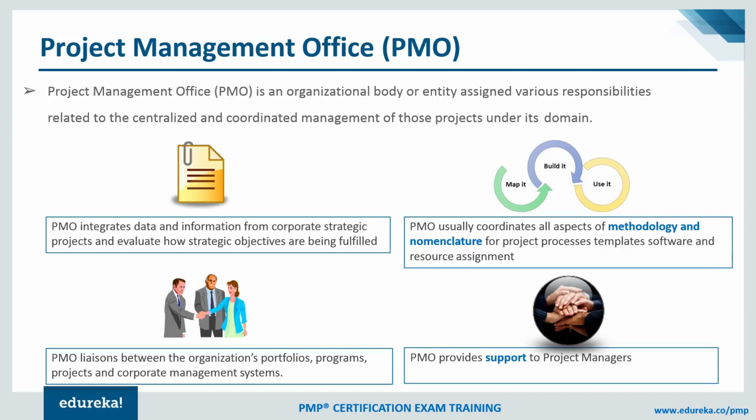Depending on the kind of authority PMO has, they will take care of different things. They may create the methodology, or PMO may just maintain the methodology and ensure that the project team and the project managers are adhering to the processes which have been defined. PMO works as a liaison between the organization's portfolios, programs, projects, and corporate management system. They also take care of shared resources and shared services. Suppose there is one server which is being used by different project teams. PMO will create a structure so that different teams use it at different times.